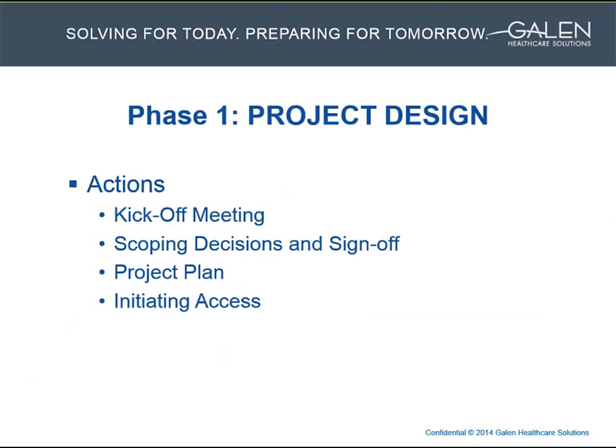The clinical analyst uses the refinement and clarification of the project scope to develop the project plan. The kickoff call is the time to make sure the process for providing access to the databases and the systems for the conversion team has started. These processes need to be started as soon as possible because it often takes longer than expected, and the actual conversion work can only begin after the system access has been granted.